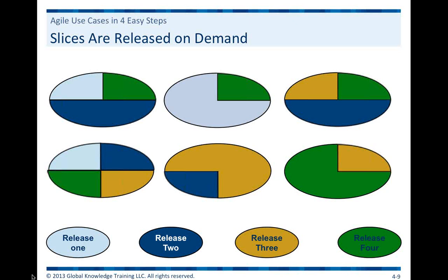What represents a slice? A slice is represented by a scenario. This isn't something that we have a lot of time to go into because it's just a short workshop, or sorry, a short webinar. We cover that obviously in a workshop, where one particular scenario is a complete path-through use case. And we determine how many transactions the use case has, and that helps us to figure out how much of it we can actually get through in a particular release. And that's the last thing I wanted to show you for today.